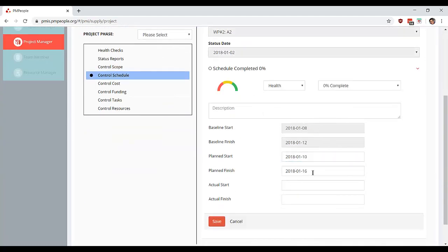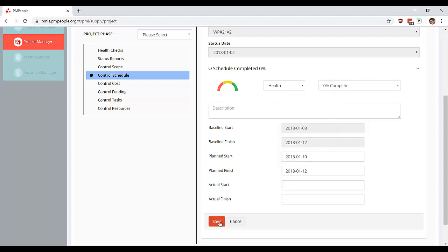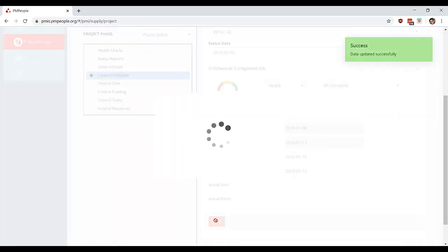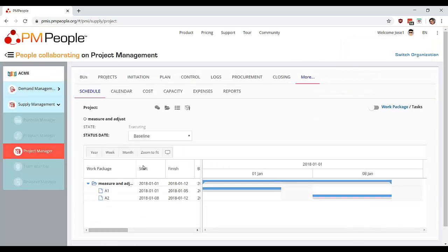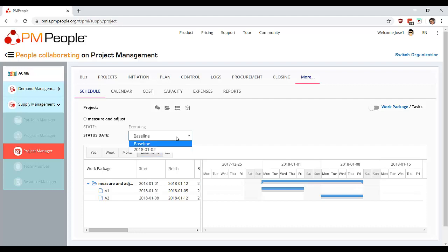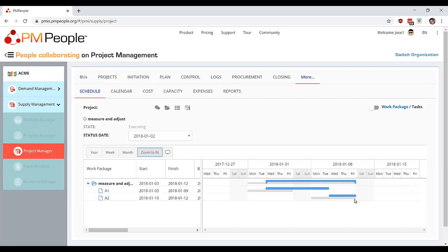Starting the day after. But we adjust and we consider that we can change the duration from 5 days to 3, so that the project is not finishing late. So we can see the whole picture here. At that time, the information is this. We forecast no final variance in time, but the first activity is starting 2 days later. Okay, and the adjustment here is that this activity is not taking 5, it's taking 3.